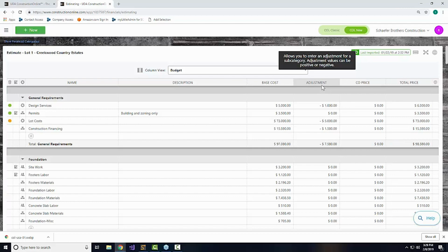So this tells me that I'm already padding my profit numbers a little bit because I'm saving money by adjusting my base cost to be, in this case, lower than I thought it was going to be. Again, the contract signed isn't going to change from these adjustments, but that money's coming in anyway.